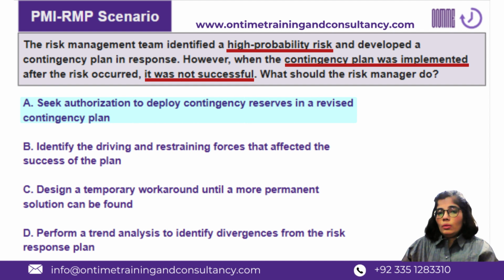because of the non-effectiveness of your contingency plan. So of course, one way or the other, the contingency reserve and the contingency plan is going to be updated, but not as a first step, right? The first step is that you need a fixation to that situation so that it doesn't get worse.